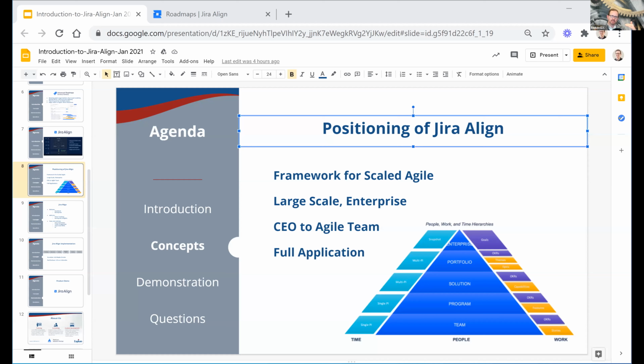So Jira epics, stories, bugs, subtasks, those all have the ability to sync over to work items within Jira Align. So if you were going up above the epic level, there's not an out of the box way to sync up. Like, let's say you set up SAFe epics or initiatives in Jira, there's not a way to sync those up currently to those higher level work items in Jira Align.